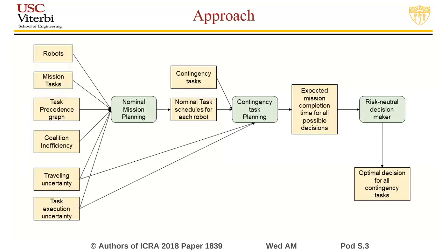For our proactive approach, the inputs are available robots, mission tasks, task precedence graph, and uncertainties associated with traveling and task execution. First, we generate a nominal mission plan. The system performs re-planning when a new potential contingency task is reported. The planner's reasoning process accounts for the probability of the potential contingency task to impact the mission tasks.